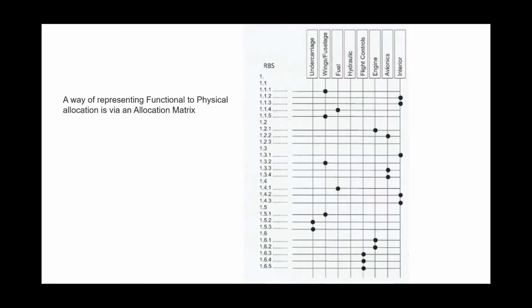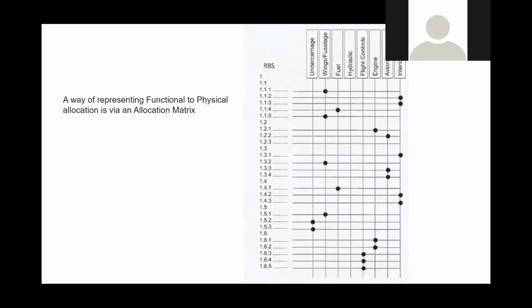Like I said, the requirements management plan documents at an early stage how you want to see that happening. On projects that I've worked on, I've seen it on design packages, because mostly the whole railway network is disintegrated into smaller work packages and smaller contractual obligations. Hence you can measure them, and in tandem you can meet those criteria, and by meeting those criteria, you can meet the bigger intent. That's how I've seen it implemented.